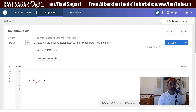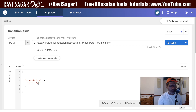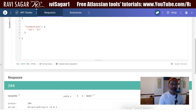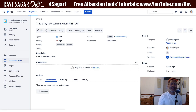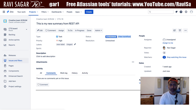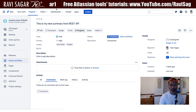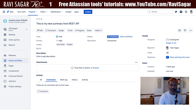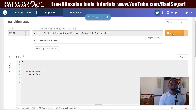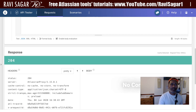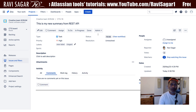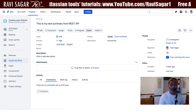The valid transition is 21 or 31. Let me change it to 21 first. If I click send, there is no error. If I go to my issue and refresh, I can see the status is now 'in progress'. I can also go back to 'to do' using transition ID 11. After clicking send and refreshing, we are back to 'to do'. For 'done', the transition ID is 31.